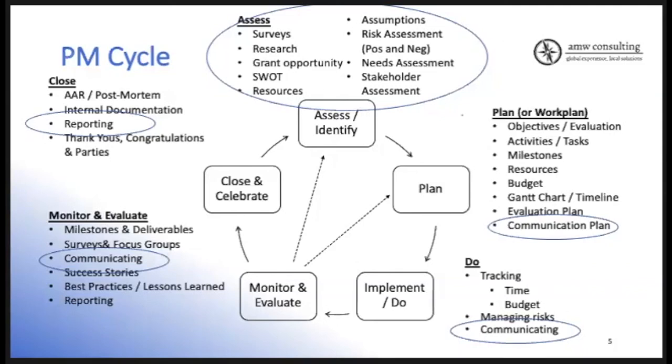Any change management needs to be managed with communication. Whether you're introducing a new system for your communications plan or a new IT system, you can't just walk in and say, this is how we're going to do it. You need to go through a project management or change management cycle, which has, shockingly, communication as the key part. And you have to do it in stages over time. Maybe start with the people that are most comfortable, so they can give testimony as to how helpful it is, so that the people who are a little more hesitant are brought on board.